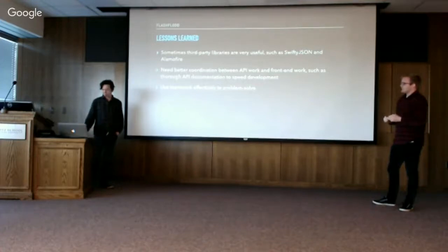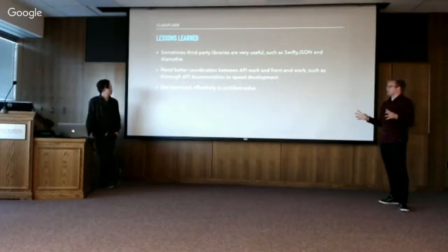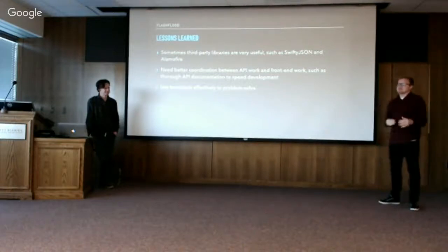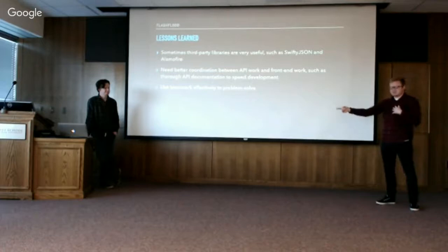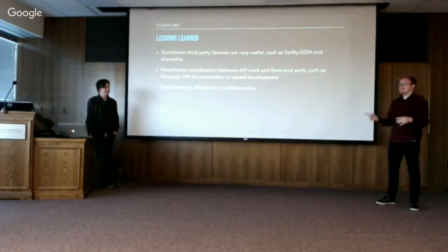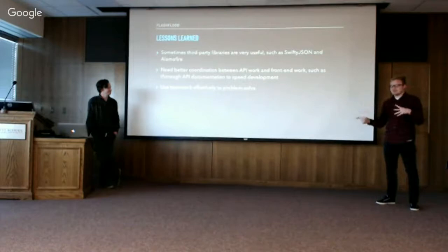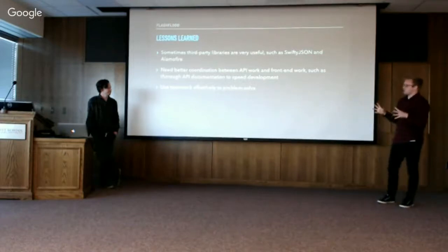Something that we could have done better was coordination between the back-end and the front-end work. With the API as it was built, there was no documentation, and so sometimes I had to ask, how does this API work again? We had to text back and forth, and sometimes it took some time to figure out whether I was sending the request correctly. I wasn't exactly sure how this API worked, so better coordination would have helped me as well.